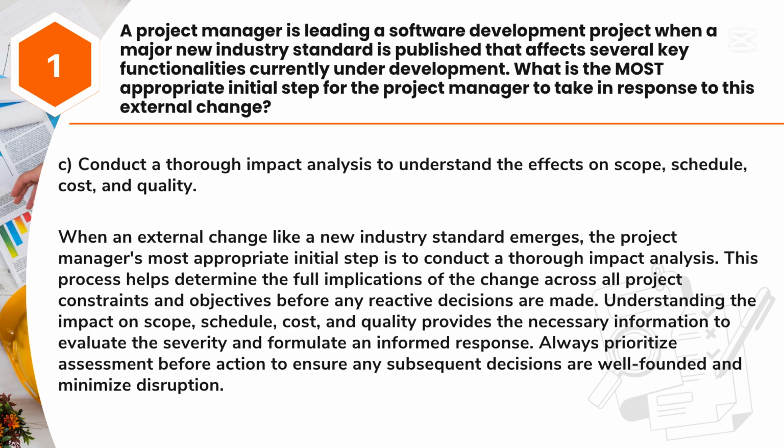Answer: C. Conduct a thorough impact analysis to understand the effects on scope, schedule, cost, and quality. When an external change like a new industry standard emerges, the project manager's most appropriate initial step is to conduct a thorough impact analysis. This process helps determine the full implications of the change across all project constraints and objectives before any reactive decisions are made.